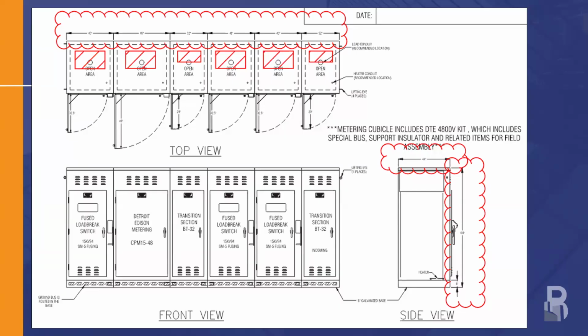So in this example from the base model, the size of the equipment got wider, deeper, and taller. So if we were coordinating based off of the engineering, now our room is way too small. So we've had to relay it out and then relay it out and relay it out again.